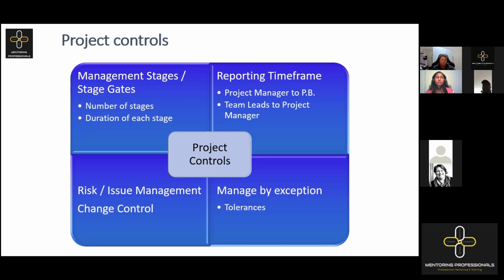The reporting time frame, so how often the project manager needs to report to the project board, and again, how often those team leads need to report to the project manager. So quite often the project manager will create their report. Quite often I see they're not actually talking to the people that are leading the teams about the work that is being done. They make assumptions in the report themselves. Then there's our risk and our issue management, our change control management, and of course that managed by exception.